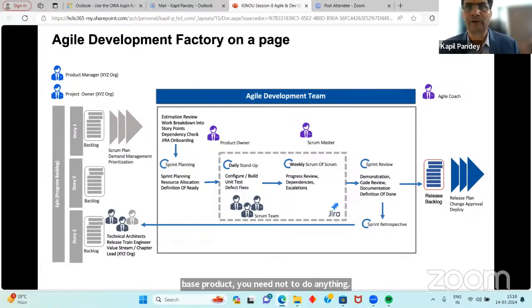So there are ways of doing the fit gap analysis. Sometimes, if you're going with a purely SaaS-based product where SAP doesn't allow any customization, then SAP says go for the fit to standard. Or if you're going for the cloud-based implementation or hyperscaler or on-premise version of the ERP, then of course it will go fit gap. Whatever gaps are there, it will come to the epic stories, backlog, then scrum planning, then sprints, 2-week sprints. Then this is the methodology again.